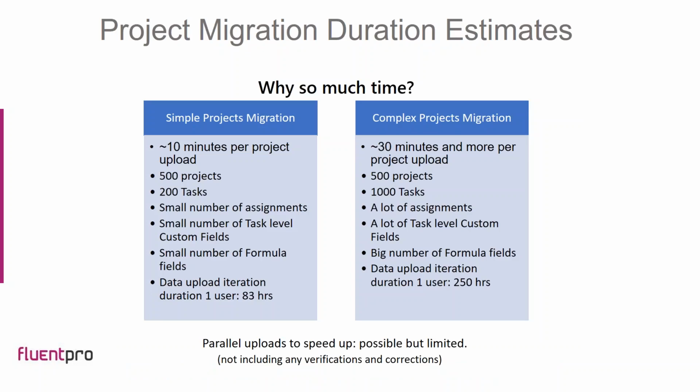When we talk about data assessment, we do it to understand the volume of migration data, and based on this volume, we can plan how long the migration will take and how complex it will be.